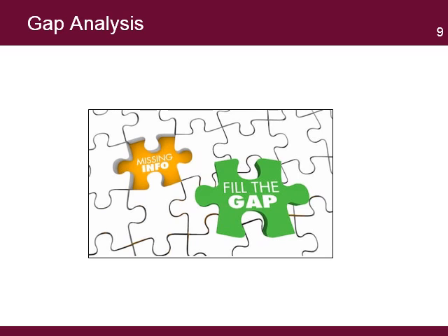Gap analysis. The project team should be able to identify the gaps between the original plan and the results it received from the process and make any modifications to close those gaps. This can be found at the moment of analyzing the information received and comparing the analysis to the original questions asked by the project.